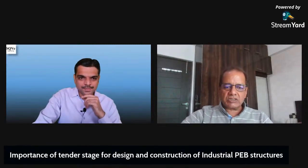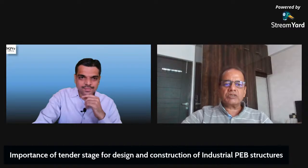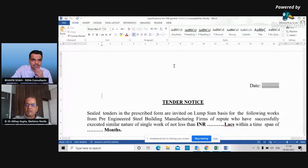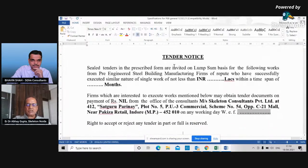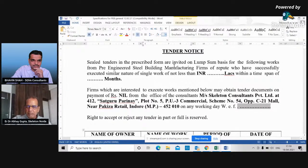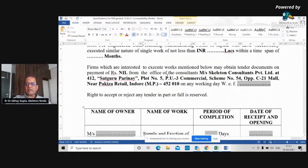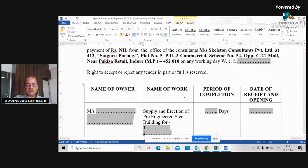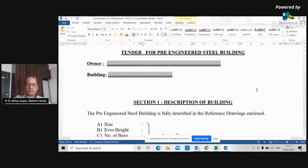Sharing the screen now — this is a sample tender notice document. It specifies the building description with approximate cost and pre-qualification criteria: inviting pre-engineered steel building manufacturing firms who have successfully executed similar single works of not less than a specified amount. General information includes the name of work, period of completion, and date of receipt and opening.